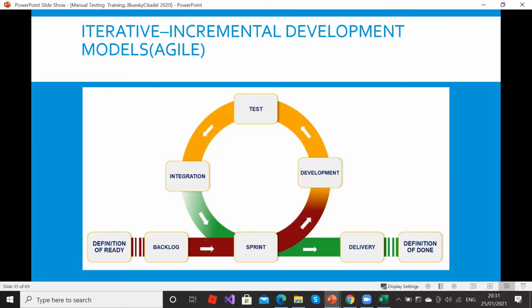The first day, which is Monday, you do your sprint planning. You've got eight days, that's Monday to Thursday. Then Friday should be majorly deployment, and demo in terms of review, with the stakeholders. All these are the things done within a sprint. Development is done by developers, then it moves to testing. After testing, integration. Of course, we are going to integrate it into the code. Then we deliver it to the client to test. Then we say yes, we are ready.